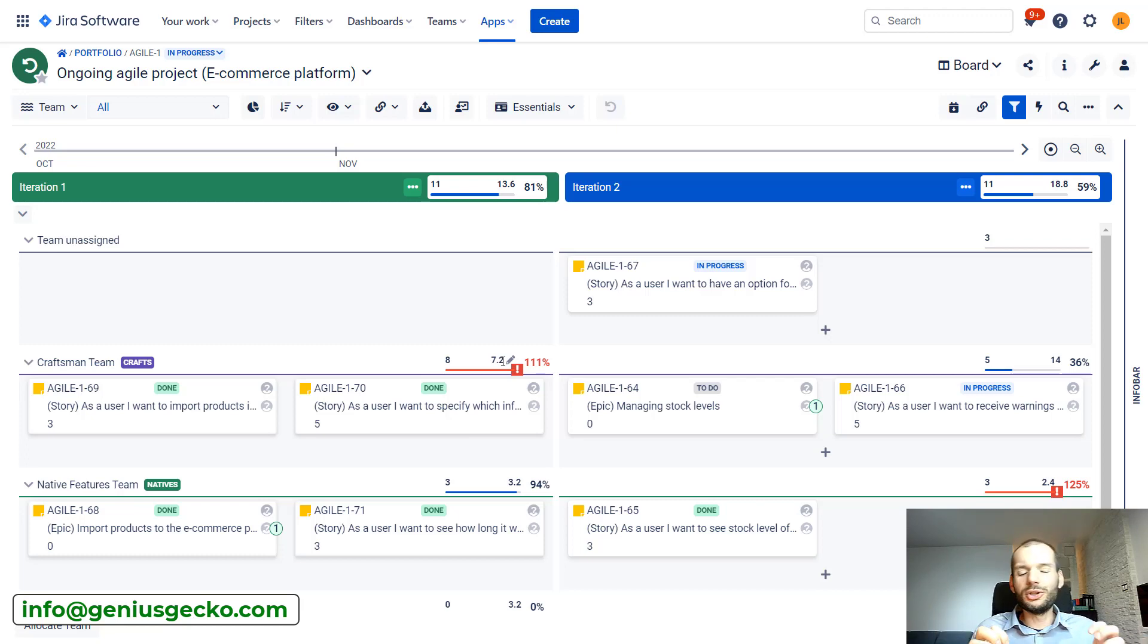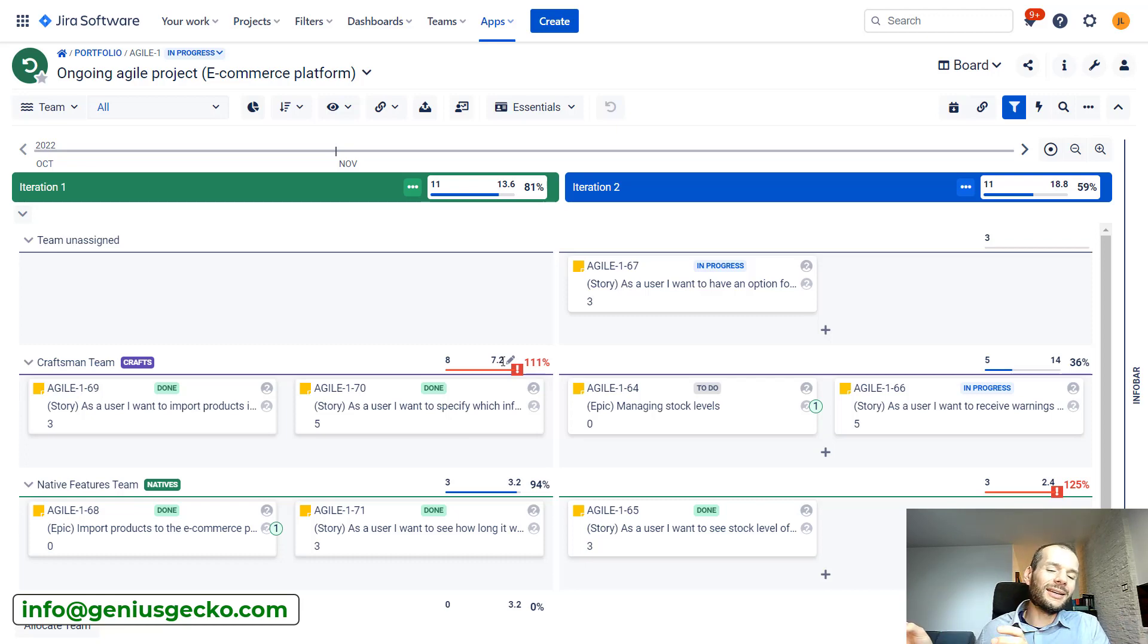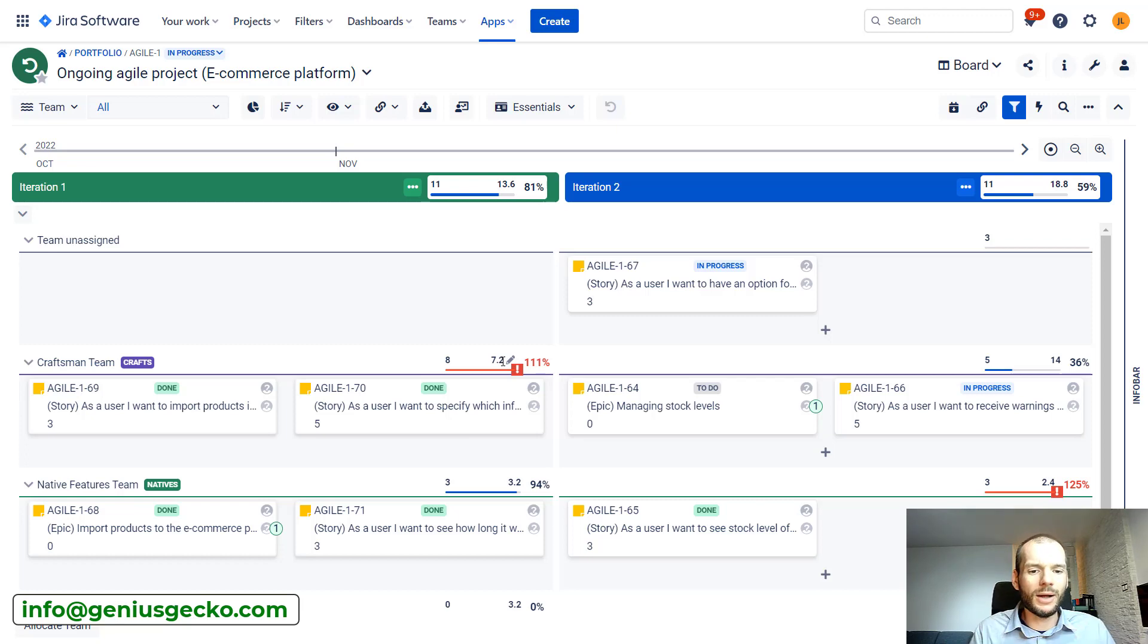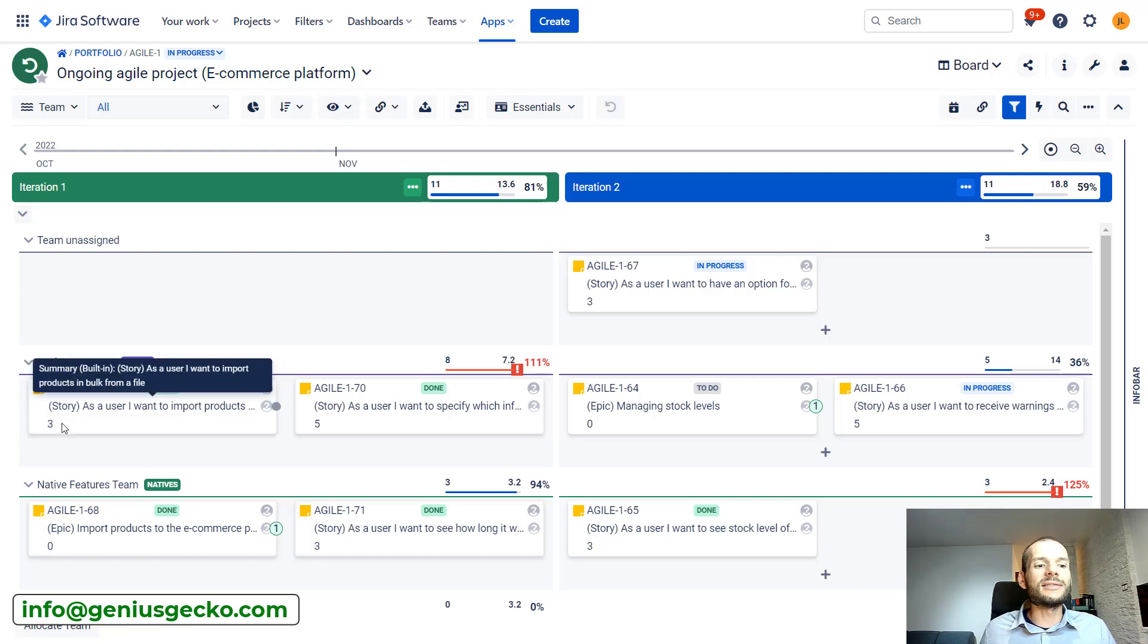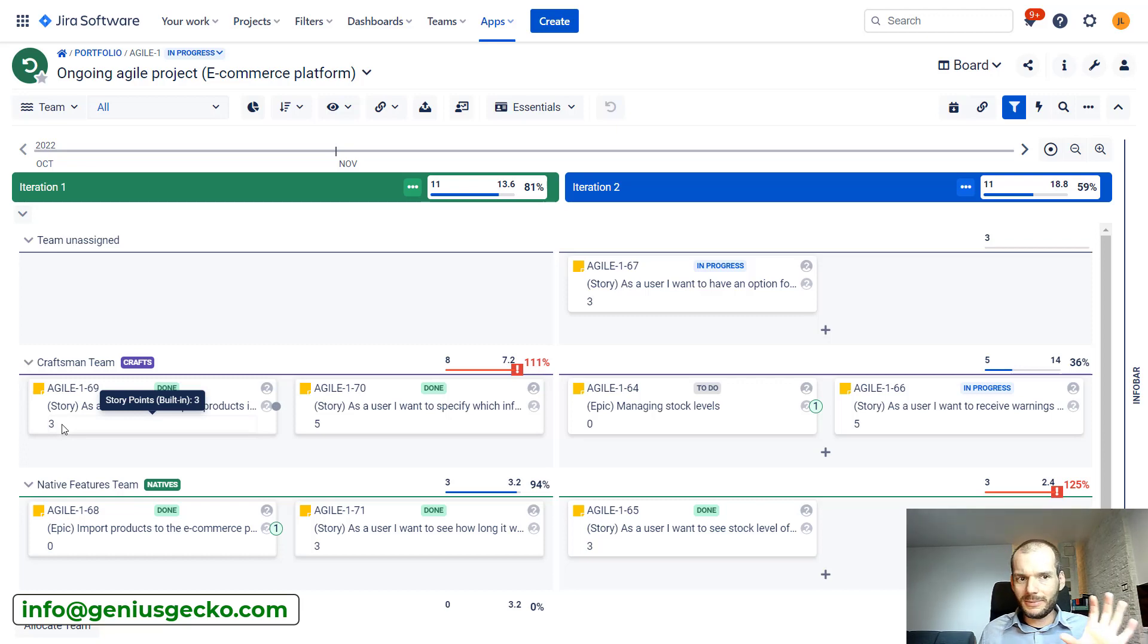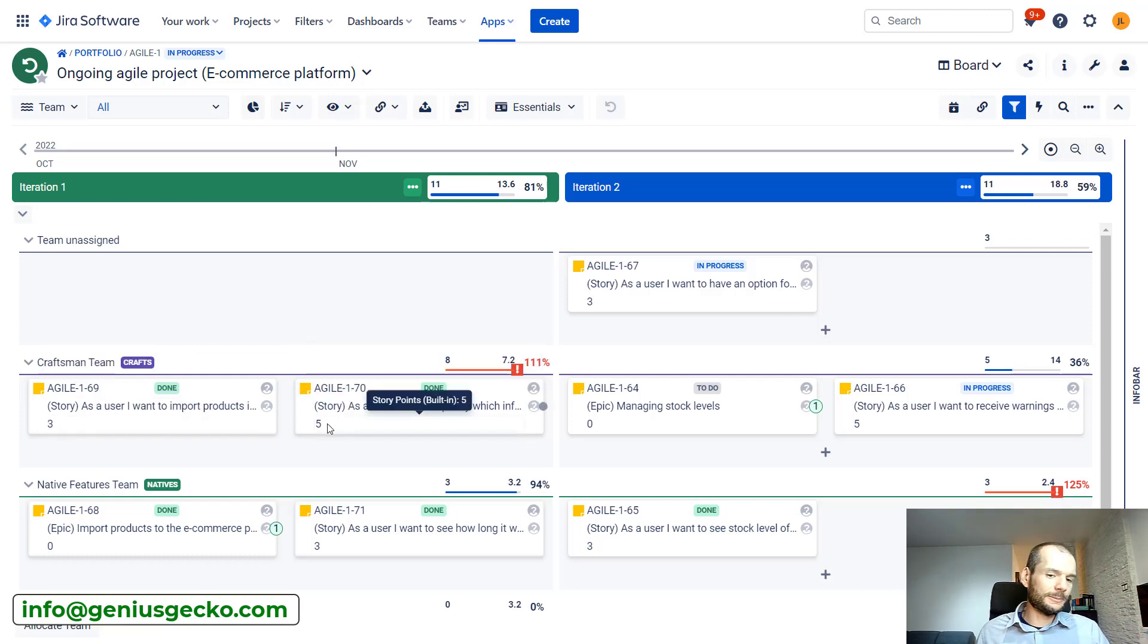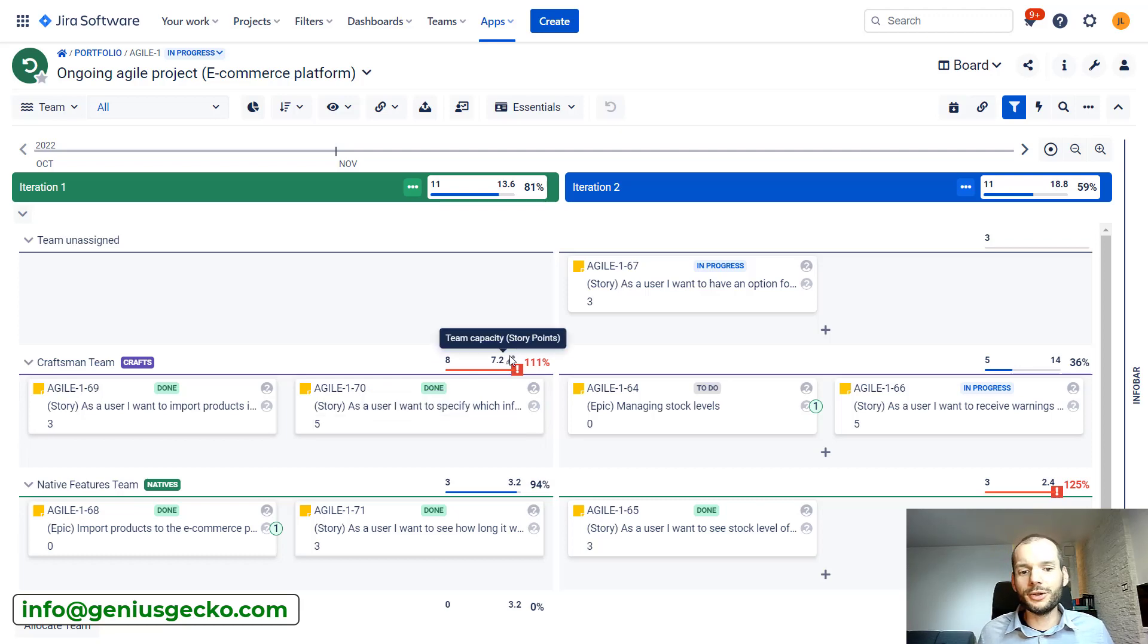There are good and bad things about that. There are several things we need to talk about. First of all, in general, that kind of calculation that we just take the amount of hours that person has and directly calculate these two story points is not the best one. Story points should be more abstract. Five tasks estimated for one story point is not the same amount of work like one task that has five story points.